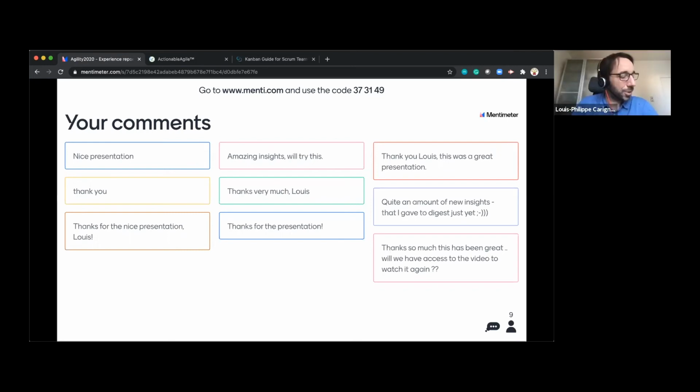You're right. That kind of makes more sense. I lean back a lot on Little's law, which is something we haven't talked about for the last hour. And so limiting work in progress will usually be my first target: how much work is the team taking on, and have we found a good sweet spot at limiting that work in progress? Most of the time, the answer is no. So to answer your question, limiting work in progress would usually be my first area from a Kanban perspective with a team.